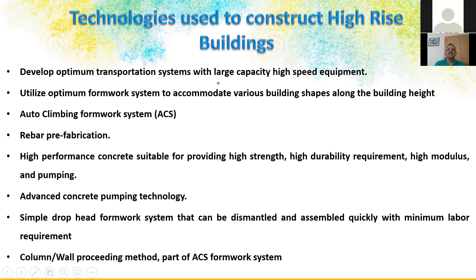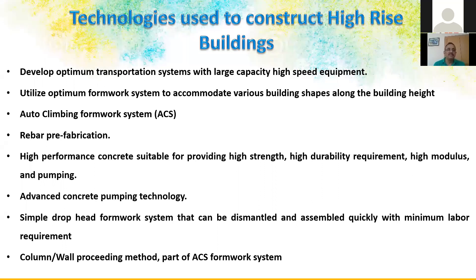Construction technologies for high-rise buildings include: optimum transportation with large-capacity, high-speed equipment for material handling; optimum formwork systems for various building shapes; auto-climbing or self-climbing jump formwork; prefabrication of rebar and structural components; high-performance concrete designed for 150-year durability with high modulus and pumpability requirements. For Burj Khalifa a special pump was designed to pump concrete up to 500 meters. Drop-head formwork systems are used for fast cycle times.